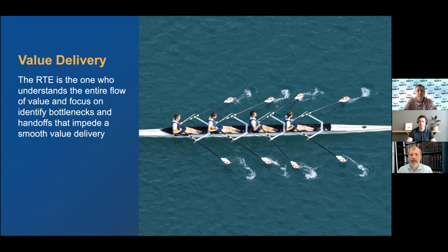And definitely the release train engineer has to know how a value stream works, where the value is flowing, and needs to understand this entire flow of value. This also means his focus needs to be on identifying bottlenecks and being conscious of handoffs and dependencies between teams, but also outside of the train, in most cases. So he's the person who has the ability to bring things together and to have this systems thinking view.